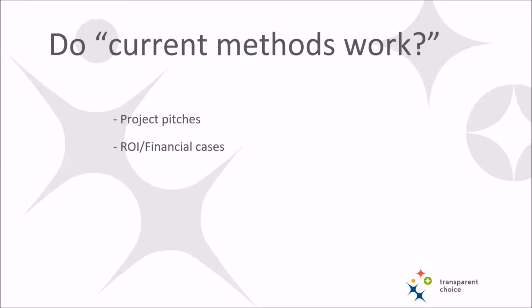The next common method that we see is using return on investment or some other financial metric to select projects. On the face of it, this sounds quite sensible. And certainly financial contribution is one component in selecting projects. But if you're just using financial aspects, chances are your projects are pointing all over the place. You can have a positive ROI that takes your company in completely the wrong direction strategically.